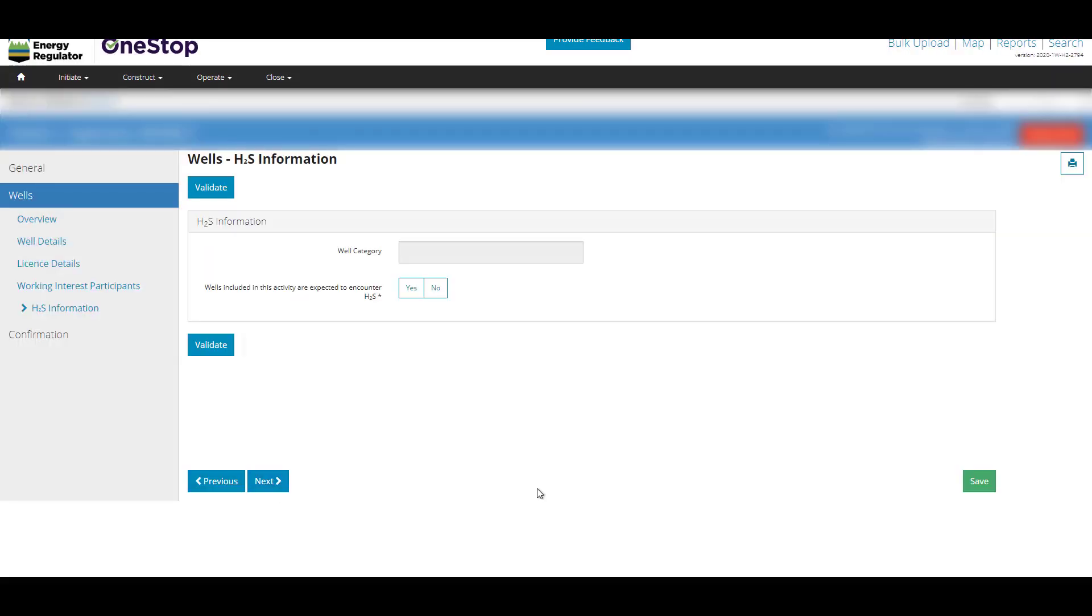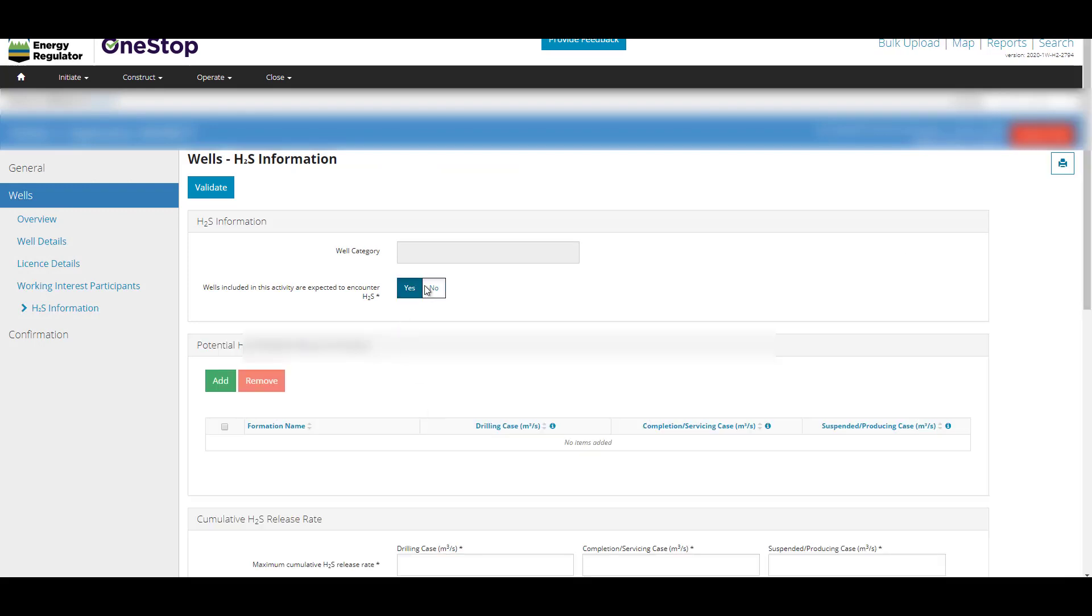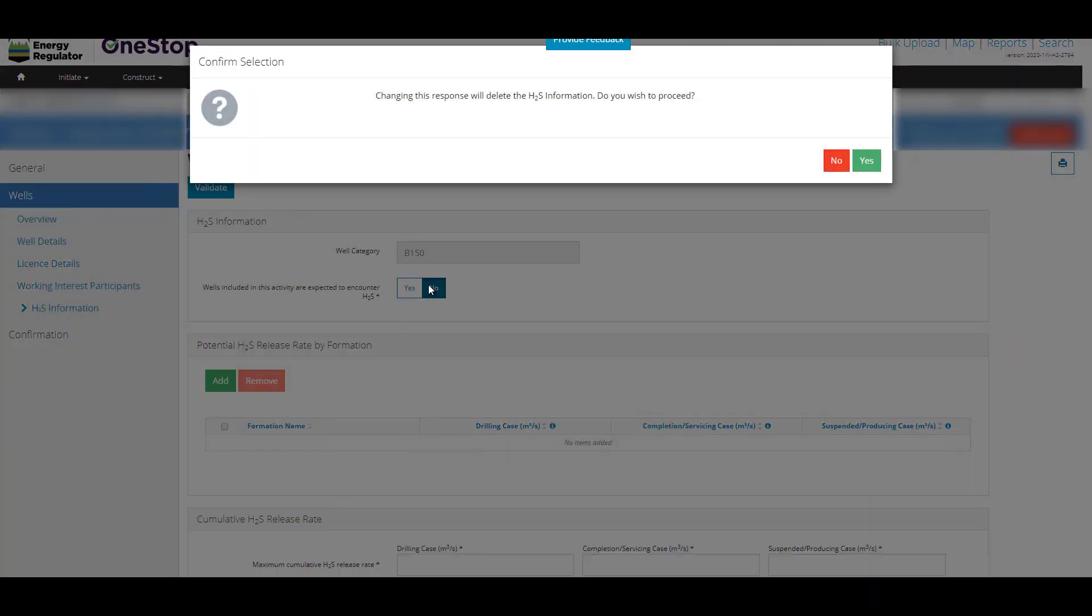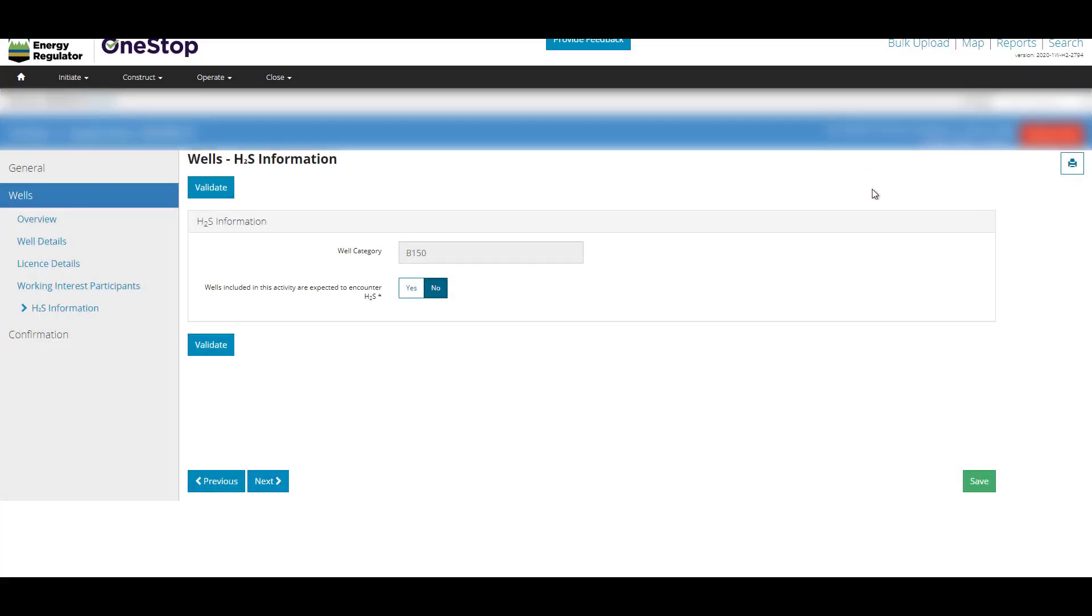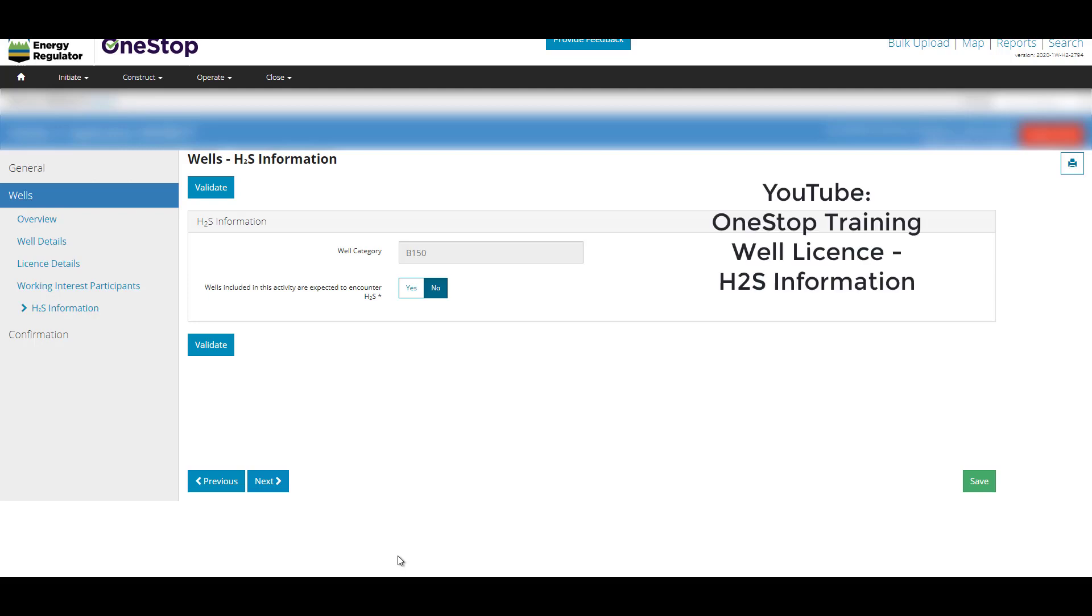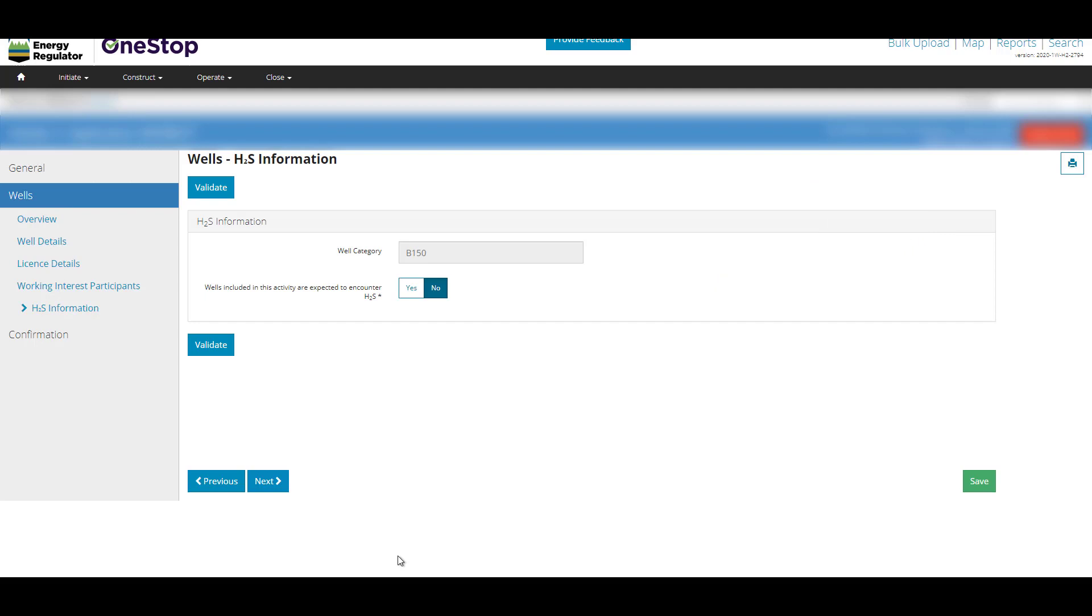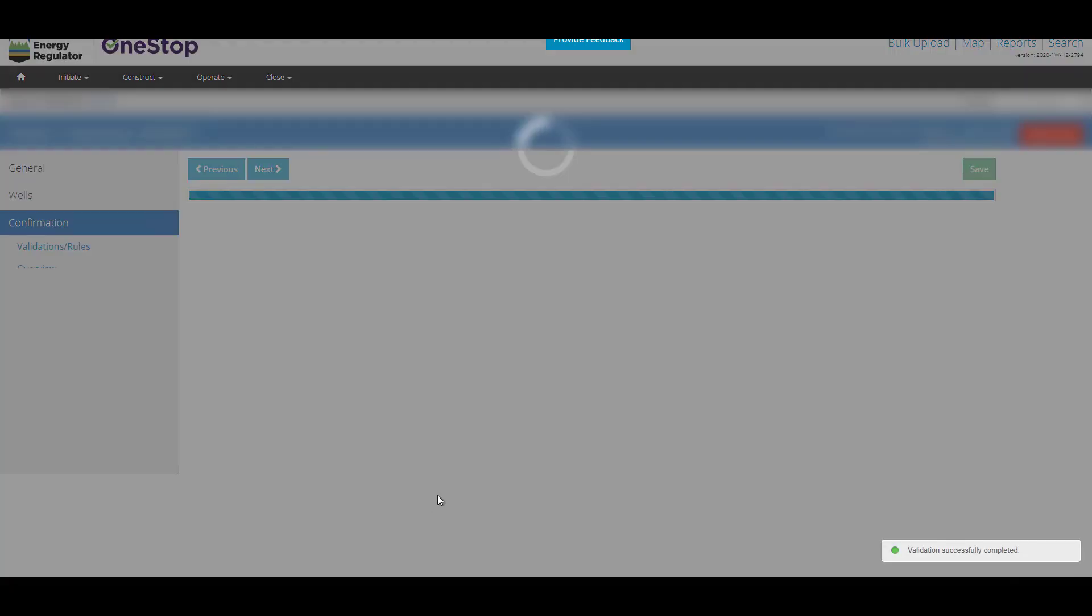On the Wells H2S Information page, click Yes or No to indicate if the wells in this application are expected to encounter H2S. When you choose Yes, additional information is required. If H2S is expected to be encountered, please search our YouTube channel for the video on OneStop training, well-licensed H2S information. Click Next.